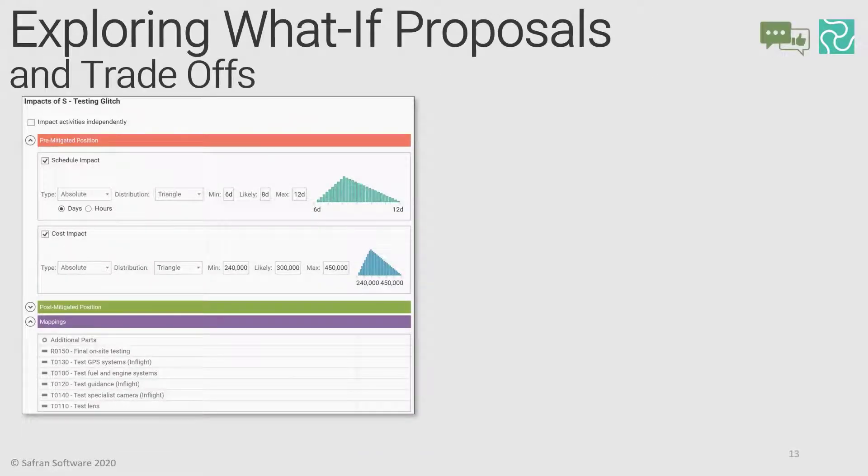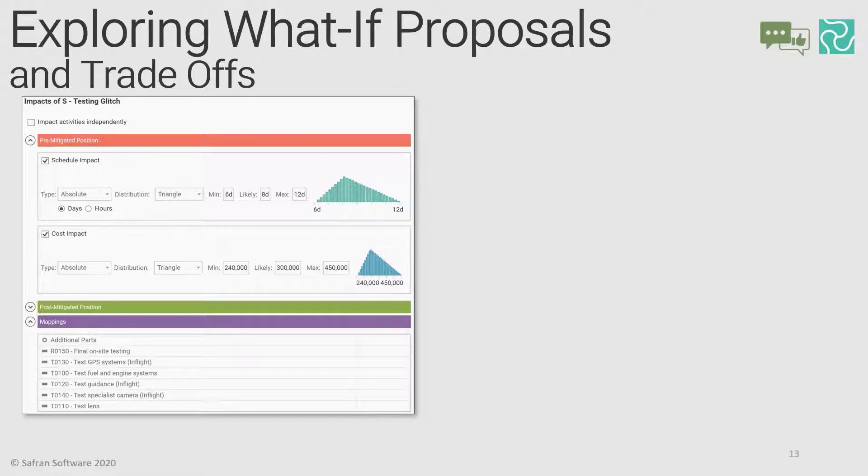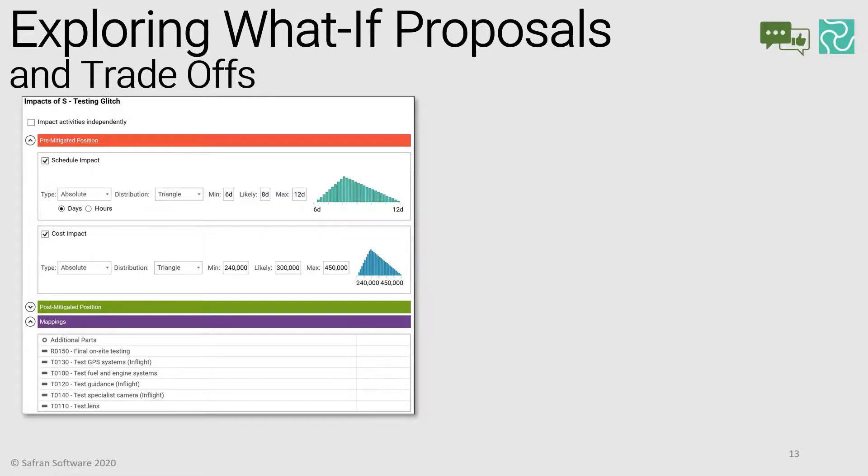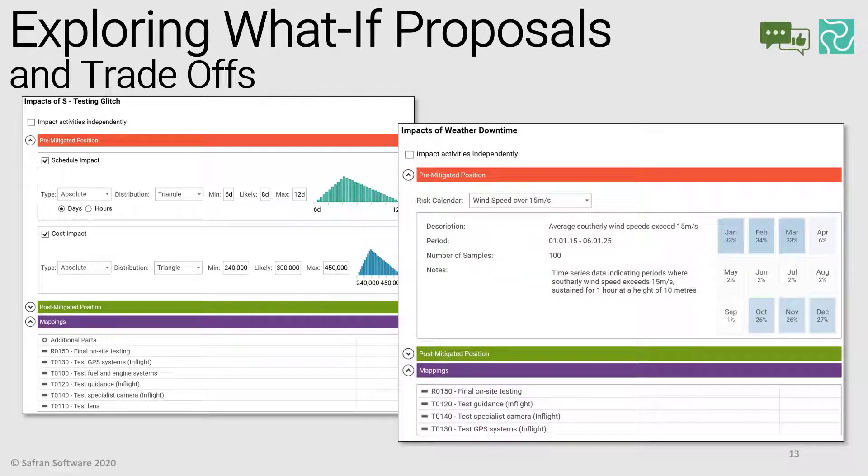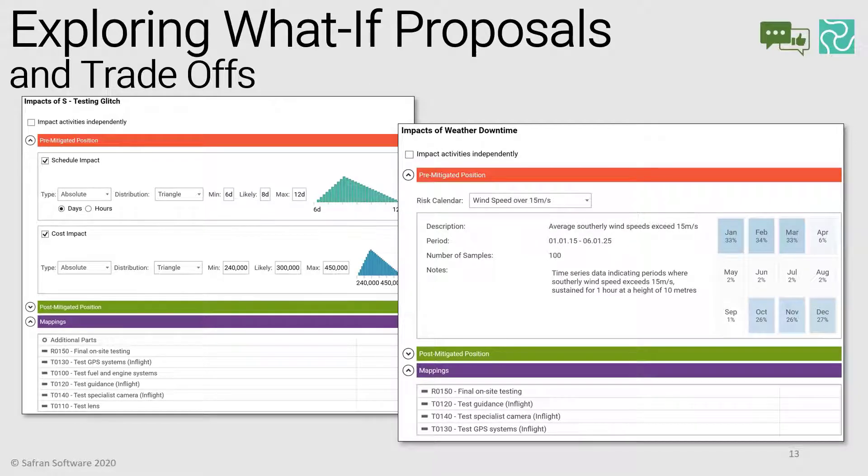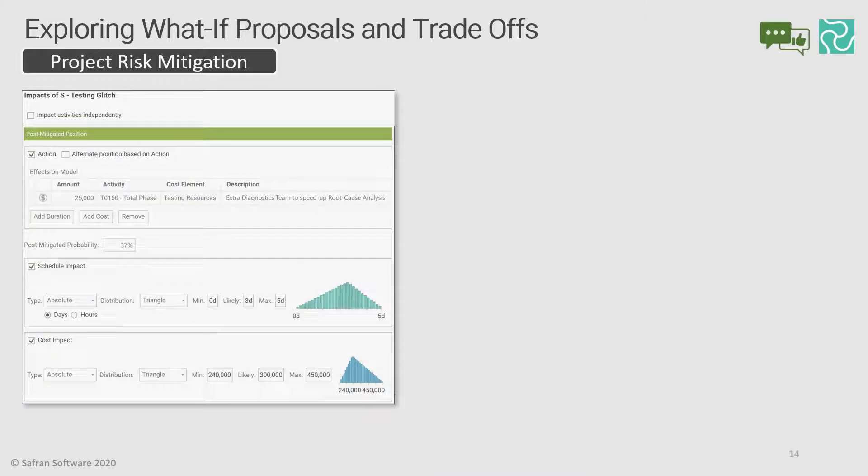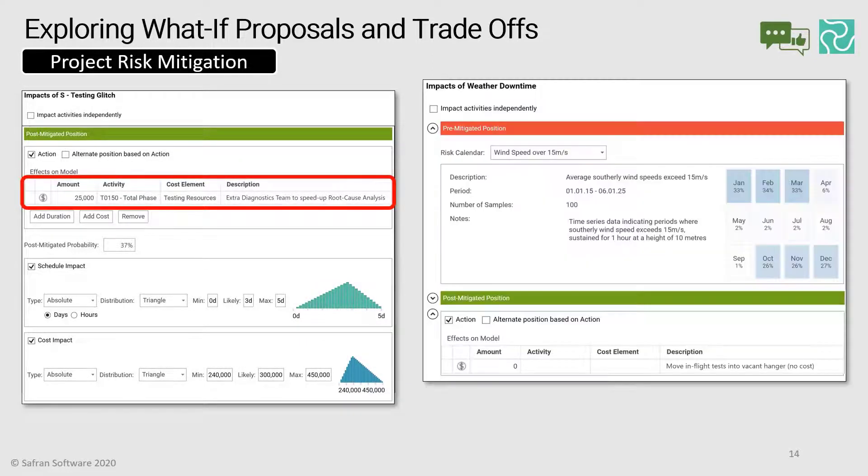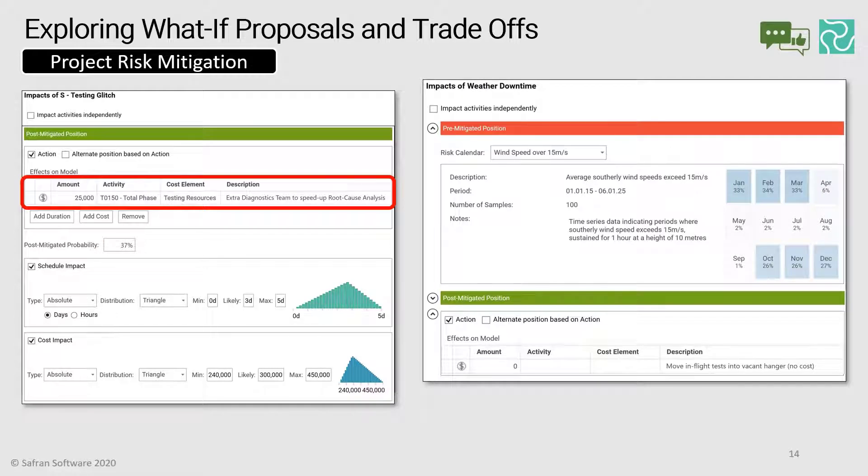So the typical and most basic method of exploring a what-if scenario would be to hypothesize the likely change targeted mitigation strategies would deliver. So in our example, we can look at the two top schedule risks affecting the testing phase of the project: testing and the weather downtime. For the first one, we propose supplying an extra diagnostic team to speed up the root cause analysis of the testing problems, get those drones fixed, flying again sooner, so we're on the airfield for less time. Now, this is going to cost us upfront investment of 25,000. And as for weather downtime, somebody notices that this disused airfield has a disused hangar, which means that the wind speed, as it creeps up, we can actually just move indoors and resume drone test flights at no additional cost.